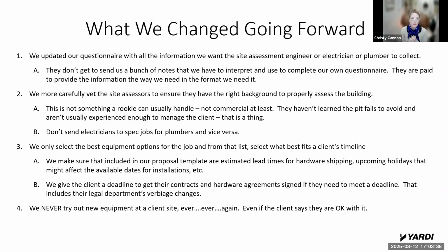So just kind of sharing the fruits of the lessons that we learned from this whole process. So here's what we changed going forward. We update our questionnaire, as I just showed you, with way more information. We're not taking anything for granted. We're not assuming anything is common sense, just like the fact that magnetic switch readers don't work on cast iron. We also require our contractor who's doing the site assessments, electricians, plumbers, whoever they are, they have to complete that questionnaire and get it back to us.